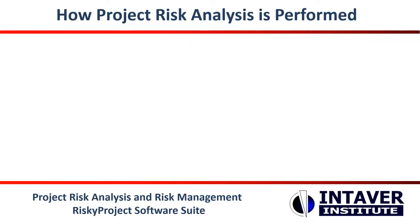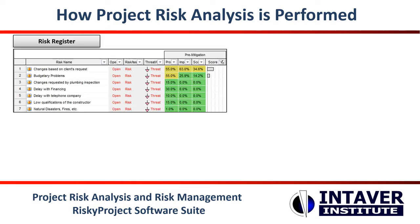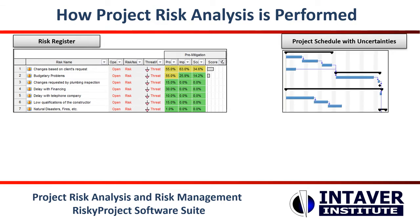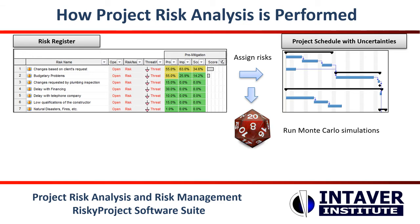As a review, to perform quantitative project risk analysis, you need two sources of information: a project risk register and a project schedule with uncertainties. Risks are assigned to the schedule with probabilities and impacts, and then a Monte Carlo simulation is run.